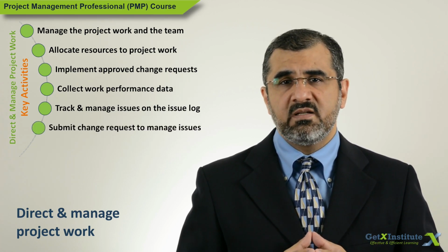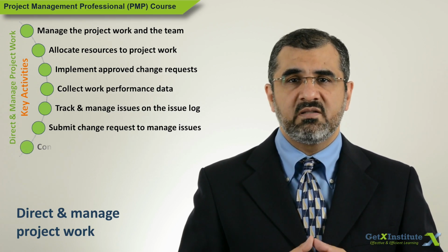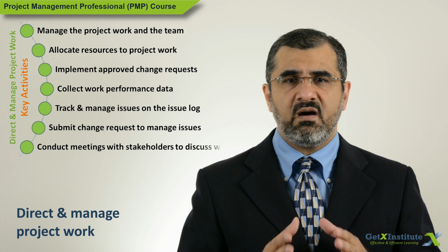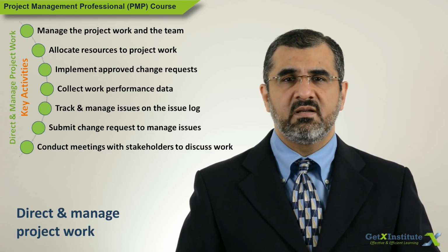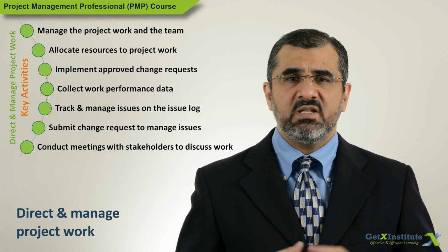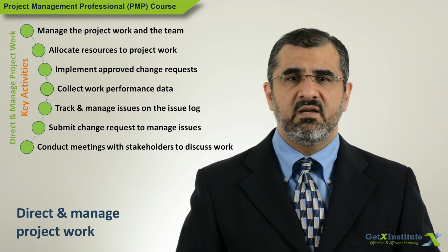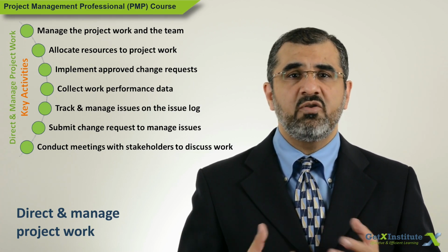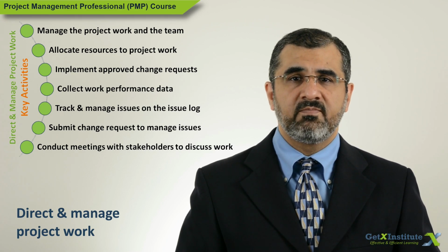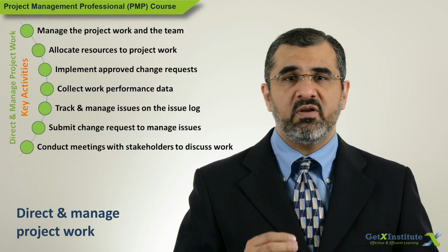A change request may be suggested in the direct and manage project work process, though usually change requests are identified in the monitor and control processes. Sometimes the project team gets stuck with work and cannot proceed. This can happen if the work asked for by the plan is not doable in practice. In this case, the team will put up a change request to modify the plan.